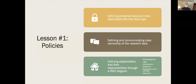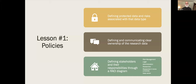Defining stakeholders and who has what responsibility is really important. We had to go to the CISO, the CIO, legal counsel, and if they had risk management, we had to go there too. Another thing that came up was: who actually owns the data if the researcher gets it from an outside entity? That entity has to be involved as well. A lot of universities are self-insured, so risk management has to be part of the discussion because they'll be on the hook if something gets breached. We came up with a RACI diagram — responsible, authoritative, communicated, and informed parties — and coming up with that and clearly understanding who does what was absolutely crucial. Building that RACI is now part of our agreements with the other schools.